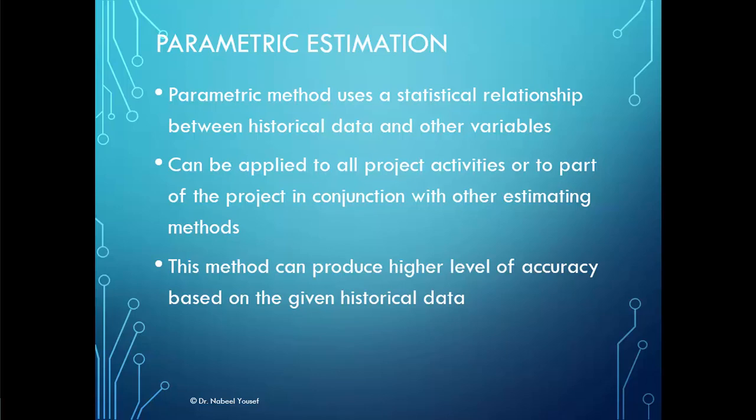For example, maybe in a previous project we had 60 linear feet of Cat6 network cable installed for a small business, and the cost for the 60 feet was $300. So what will be the cost of installing 90 feet in the current project, since we are buying from the same vendor and the same type of wire with the same linear foot price?